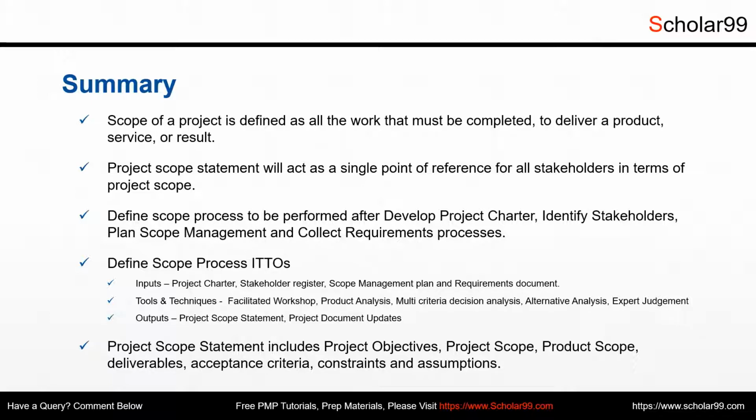The project scope statement includes the project objectives, project scope, both in-scope and out-of-scope items, product scope, which are the features and functions of the project, deliverables, acceptance criteria, constraints, and assumptions.